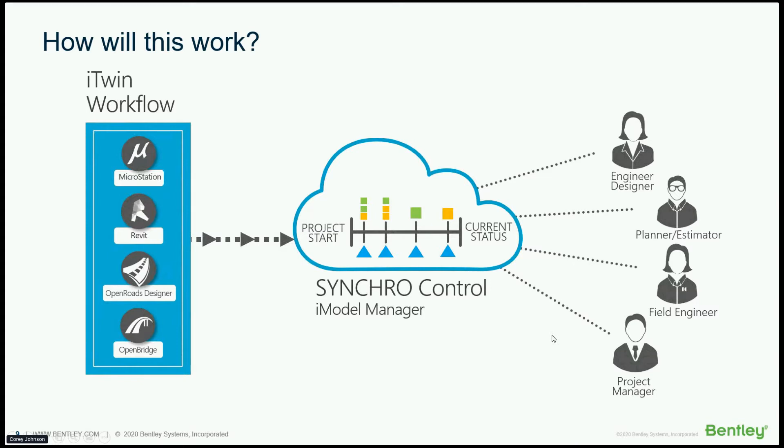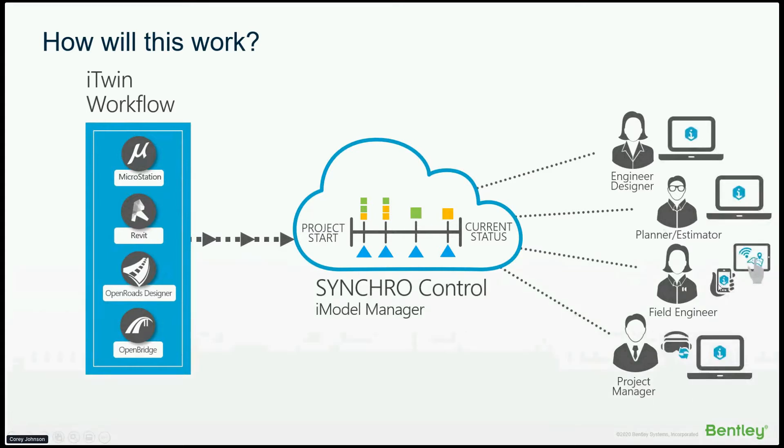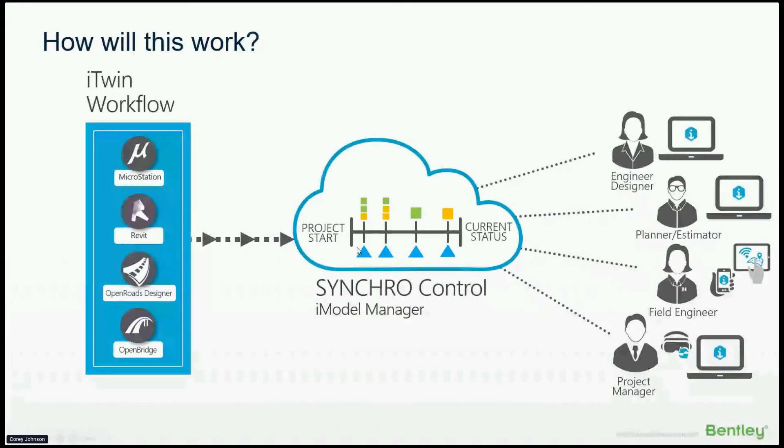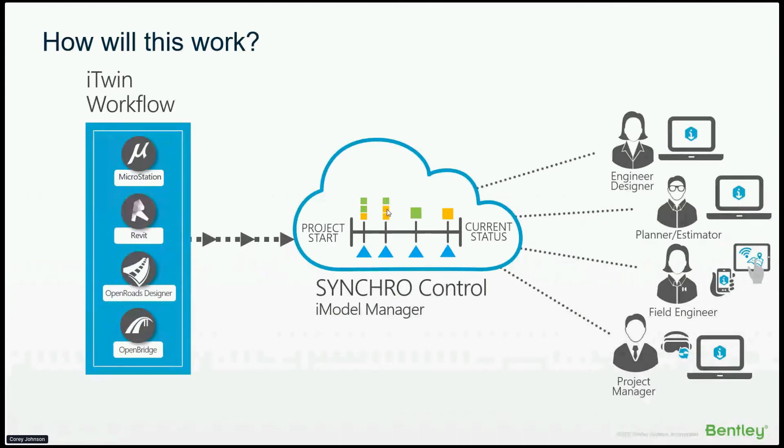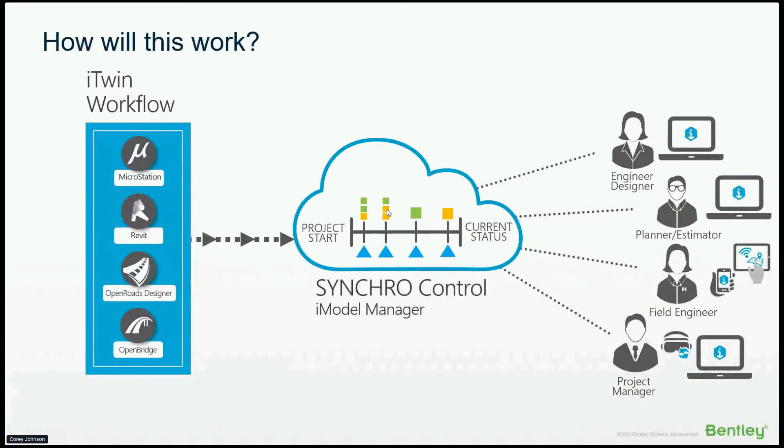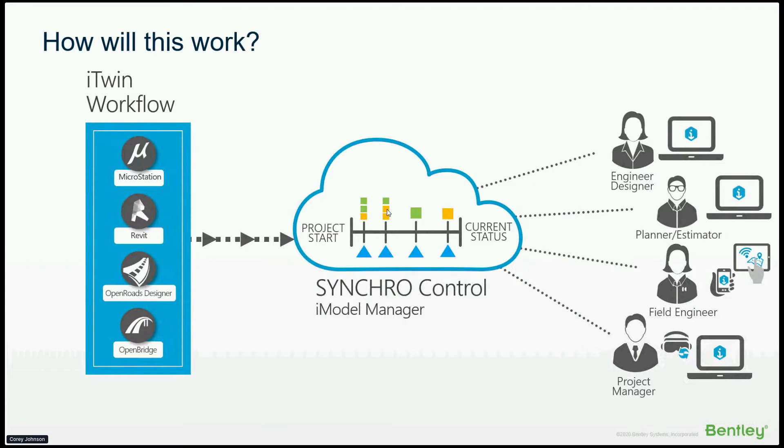And then we have all these folks that can use it for additional purposes, and they can use any type of device to access it. Now when we do this, it's very important to track change sets because things are going to change. And that's these little boxes kind of imply - if I assign cost codes or I break down this model and it changes the next day, what happens to that breakdown? What happens to my quantities takeoff in my estimate? We can actually track all of those changes and validate those. This wall is now 20 feet longer, and we know when it changed and what we do with it.